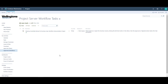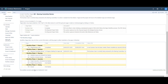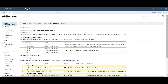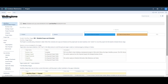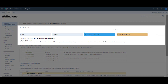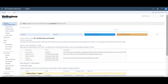I'm now going to switch back to the original user's browser and refresh the page. The project has now progressed into the planning phase — the detailed scope and schedule stage. At this stage of the project lifecycle there is additional information required, and we can see that two new project detail pages are now available for the project manager to populate: these being Project Financials and Project Status, neither of which were visible during the earlier stages of the lifecycle.